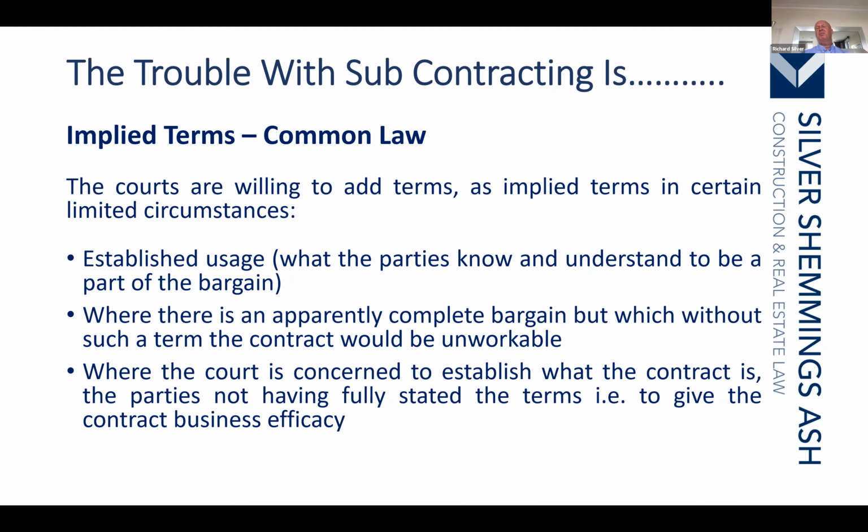A prime example is, I say to you, please carry out 10 metres of mastic. It's an offer for you to do it, and you then undertake it. You've accepted. But we've failed to agree how much you're going to be paid. But there is an agreement. What are you going to be paid? We get an implied term: a reasonable amount.